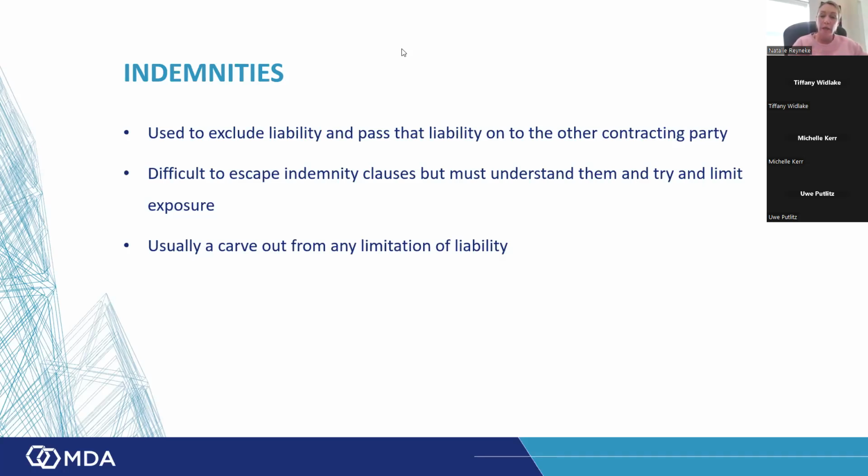So the employer should apply for that extension. Yeah, I think that is a difficult thing that employers probably don't realize. Yeah, exactly. The way the FIDIC does it is quite nice, in that it specifies the process, and then there's a claim made by the employer, and he can then extend that defects notification period. So, yeah. Thank you very much.